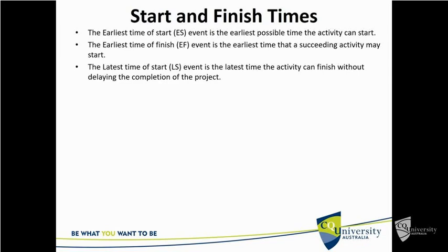The latest time of finish, LF, is the latest time an activity can finish without delaying the completion of the project. And if we know those times, then we can calculate what the float is, what our little padding is where we can have a few weeks here and there.